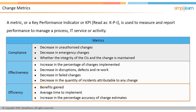For efficiency: benefits gained — that is the value of the change compared to the cost incurred to implement the change — average time to implement the change by urgency, priority, or type, and increase in the percentage accuracy of change estimates.